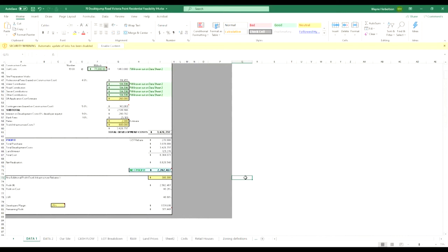It's pretty straightforward. Just got to do the DA. And again, I don't even think you'll need 260,000 to do a DA on such a small allotment as this one, with only 19 lots, as long as they make it accessible. So how long do you anticipate the DA process? It'll be 2 years. That's why I've made a 2-year option process. Okay, so 2 years. Yep. That's why the option period's 2 years.